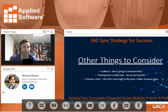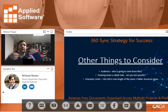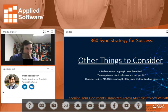I would try to rely on my document management system to leverage that. So basically, when you upload the file, metadata gets attached to that file, telling you when the file was last updated. So rather than putting the date on it, because if you're counting dashes or dots, that is 4, 6, 8, at least 10 characters that you're wasting there. But if you have to do it, then I suggest putting it first, because that's going to make it the easiest to alphabetize and to manage.